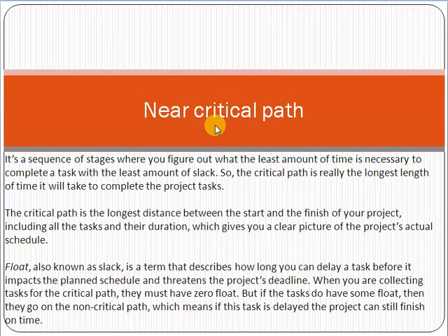For example, if we talk about an e-commerce solution, what are the high level activities here? You have to do the project planning, then the software development, then the quality assurance, then the user acceptance testing, and then the production deployment. These are the very high level activities which you have to include in your project. You have to make the sequence of activities here.